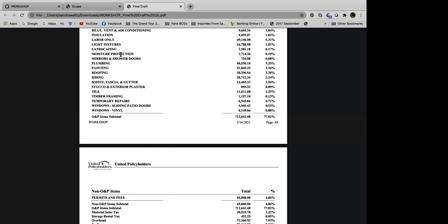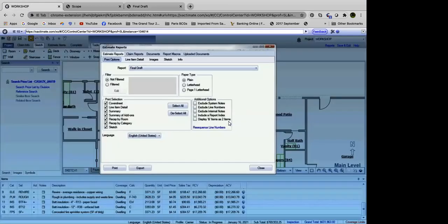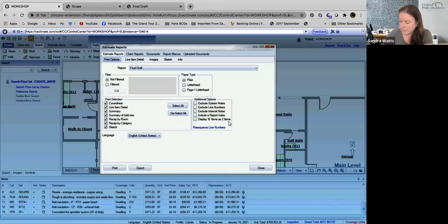My estimate used the date October 2020. We'll rebuild mid 2021. What date do we want to use for the estimate? You've got to use now. They can't, there's no projected estimates. I mean, price list, no projected price list.